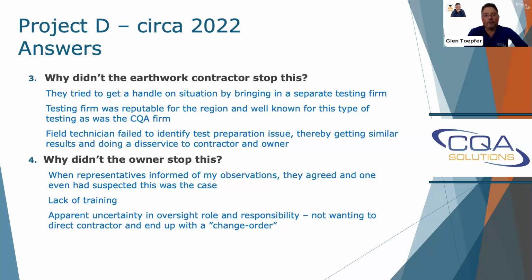And talking to the owners, when I started mentioning my concerns, at least one of them agreed with me, and they thought they had seen it too, but they didn't want to speak up. They were primarily worried that they would be directing the contractor at that time, and if you direct the contractor, everybody's worried you're going to get a change order. You make them stop, they're worried you're going to get billed for lost operating and standby time. So that was a big one.